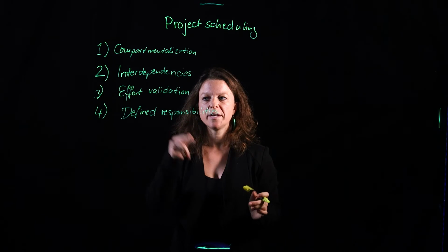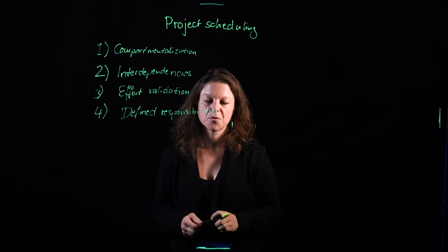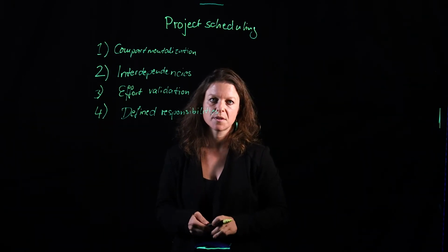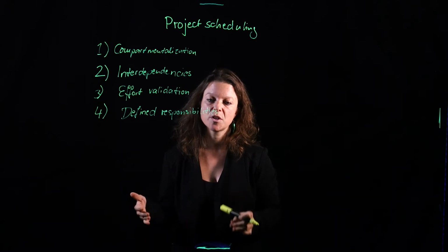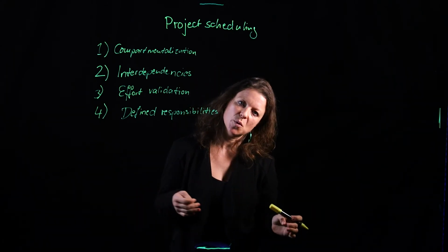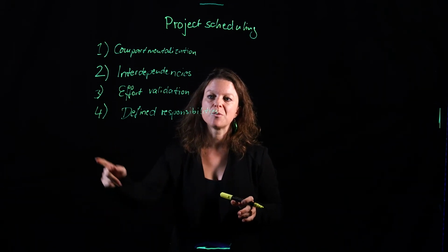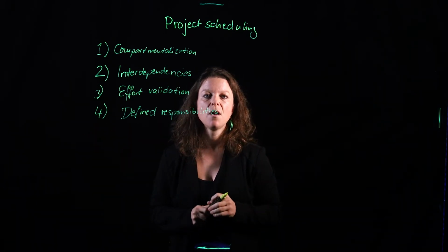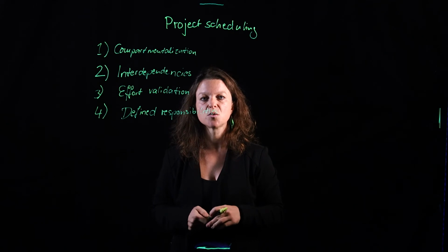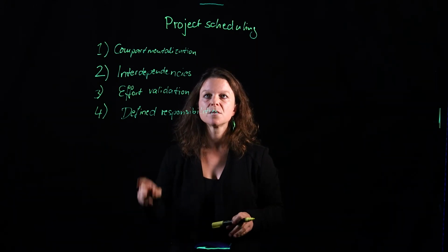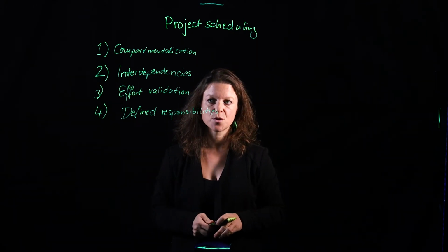So in a study that we've been doing for a few years now, this is a global study that has run in its 3rd iteration, that's called Naming the Pain in Requirements Engineering. One of the biggest problems was actually during development that responsibilities were not clearly defined and the roles were unclear. So this is the 4th principle for project scheduling, and really important.